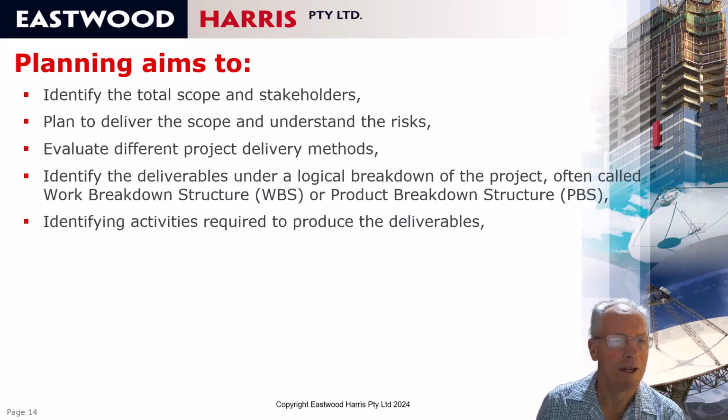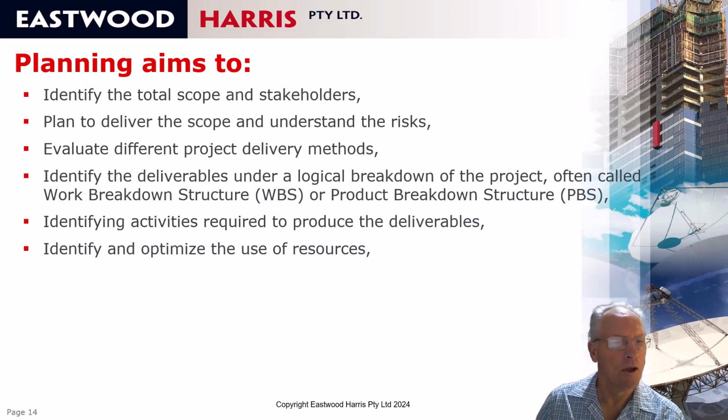You then need to identify the activities to produce each of the deliverables, so each WBS node will be broken down to deliverables. So if a WBS node is a concrete slab, then the deliverables will be forming, RIO, embedded items, pouring the concrete, curing, stripping and quality checking. You then need to identify and optimize the use of resources.